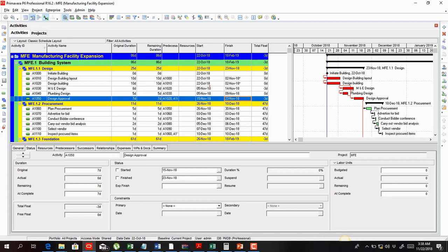However, if the must finish date is greater than the planned finish date of your project activities, most of your activities are not going to be on the critical path. So that's essentially about the constraints, and so you decide exactly when to use them, and then also how to use them.